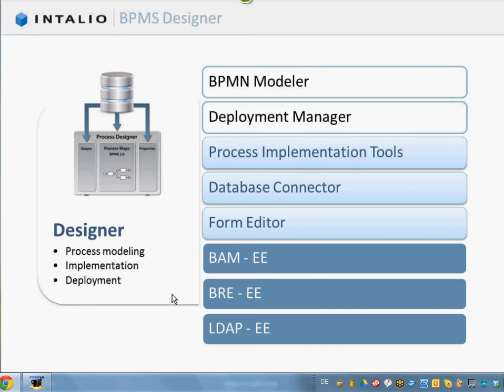Regarding the blueprint or the prototype, the prerequisite is the previous phase. We need the process map, the key process data, and the key business rules. In this phase, on-site consulting, we will build an end-to-end project for the purpose of process flow validation, detailed project scoping, and to define together the delivery planning and the project sizing. This will permit you to define exactly the team that you have to gather to work on this, and you can evaluate and size the effort to be spent in this project.